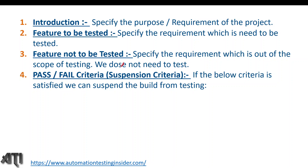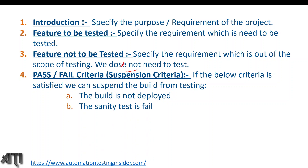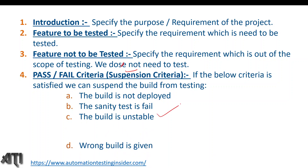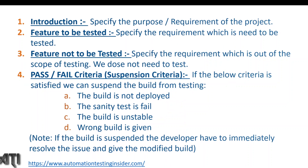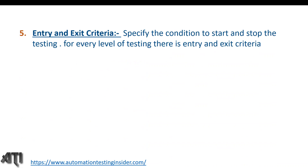Pass/fail criteria, also called suspension criteria: this defines when we can suspend the build from testing. The criteria include: if the build is not deployed we cannot test the application; if the sanity test fails; if the build is unstable; or if the wrong build is given. If the build is suspended, the developer must immediately resolve the issue and provide a modified build. These are the conditions under which we cannot proceed with further testing.